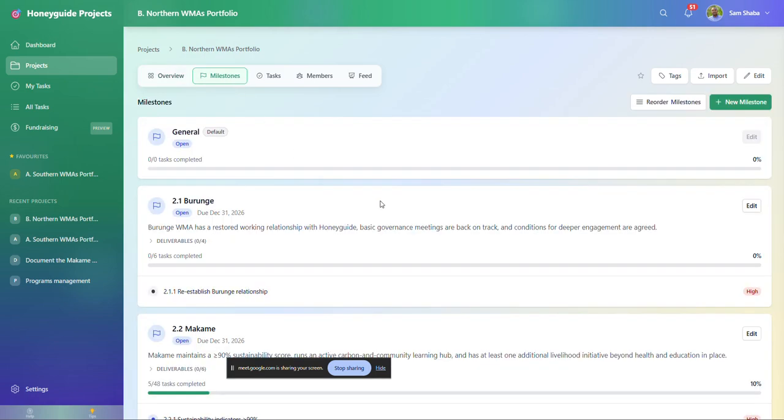Milestones in your work plan, they are the row. Every row you see in your work plan is a milestone in this tool. When you create a private project, you can decide how to break your work. Milestones are also containers of your tasks. All tasks in this platform will be organized within a milestone. You cannot have a task that does not have a parent milestone.